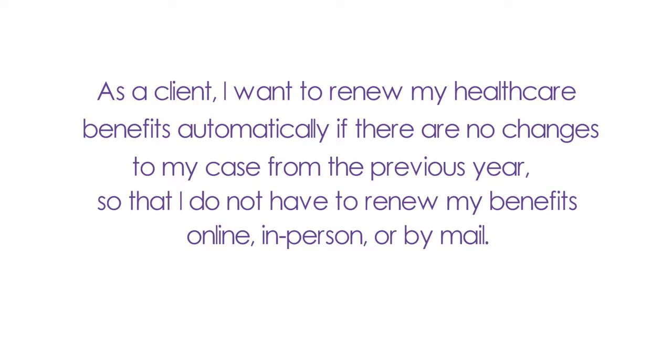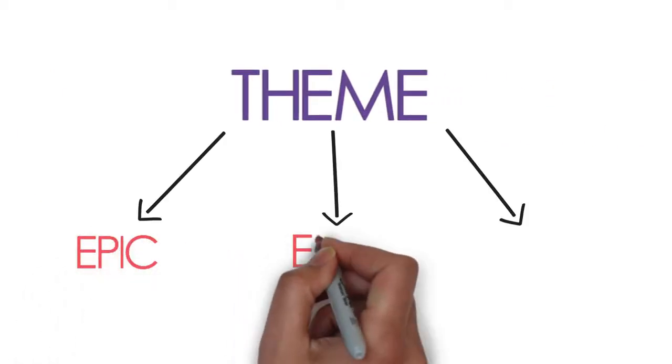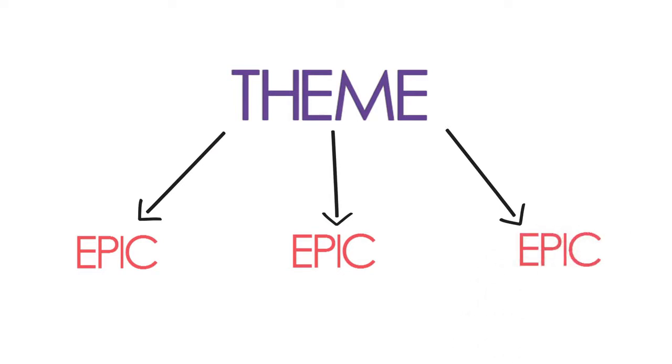As you can see, the example outlines a broad end goal that will require several smaller objectives to be achieved before the desired outcome can be fulfilled. Therefore, to establish these additional smaller objectives, the theme must be decomposed into multiple epics. Epics describe more discrete objectives that must be accomplished in order to fulfill the broader overarching end goal as defined by the theme.